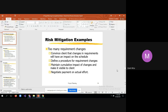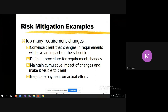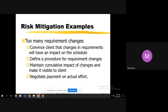Maintain cumulative impact of changes and make it visible to the client. When the client comes with a requirement, calculate the effort required and its impact — for example, one week delay in delivery and a 0.5% increase in overall budget. Maintain a cumulative impact record: for requirement one what is the impact, for requirement two what is the impact, and so on. These are new requirements they are asking to implement mid-project.